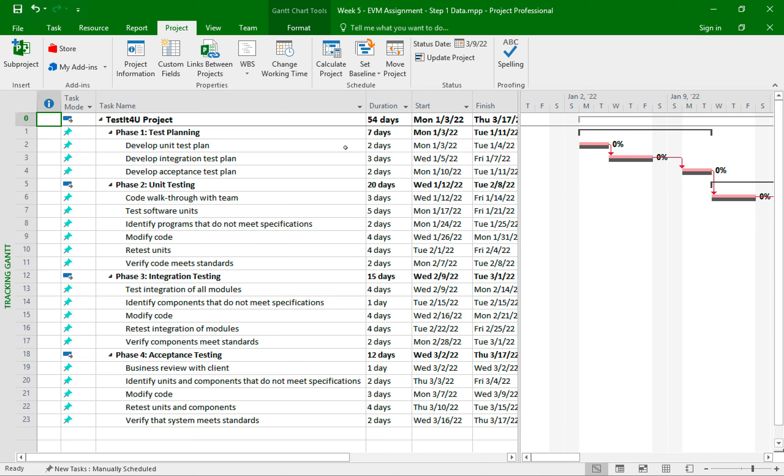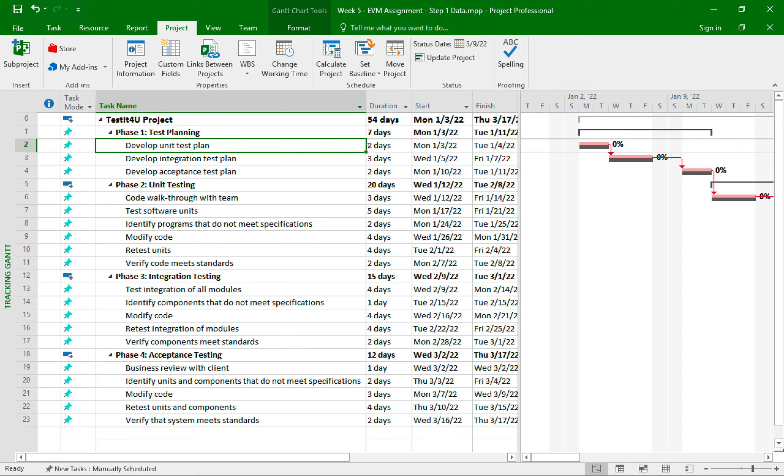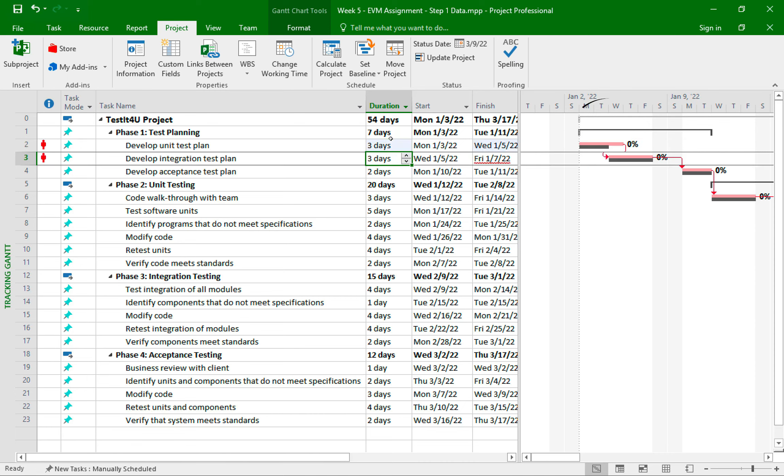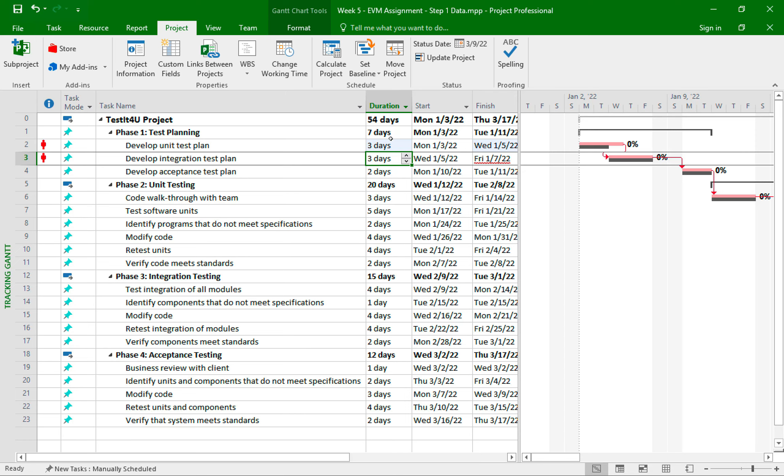For the develop unit test plan duration, the actual duration is three days. So I need to come to this cell and I just need to type over the two days and make it three days. And when I did that, we can see that the Gantt chart shows that the task's actual duration, which is the top bar, has exceeded the baseline that we made a few minutes ago. So now do you see how creating a baseline is helpful because it allows us to visualize and measure the performance of our project? Pretty cool, right?